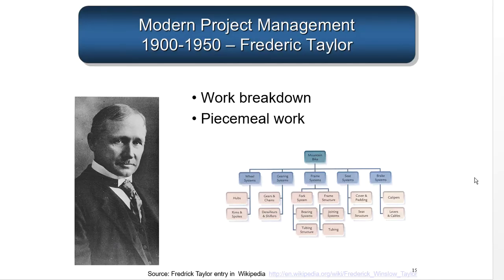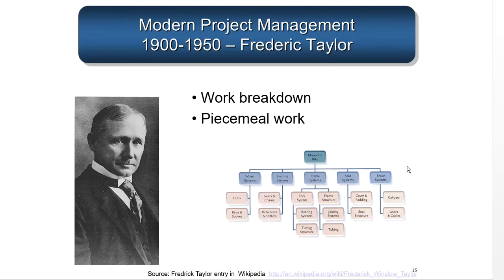Frederic Taylor was one of the founders of scientific management, but the idea of breaking down larger components of work into smaller pieces that could be easily executed, that is part of scientific management. And again, it was originally used for operation management, but now it's used for project management quite often. In fact, every project that you start, you must clarify the scope of that project. Remember, scope is what your project will deliver. Okay, so projects can be very large, so you have to identify all of the pieces required to produce that large final deliverable. And that's what the work breakdown structure does. It is an elaboration of the scope, or to put it more simply, it is a detailed outline of exactly what your project will deliver.